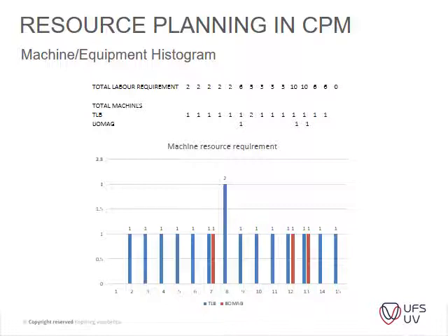On this particular day you need 2 TLBs, and this is what the exercise shows: you don't have 2 TLBs to use, and you don't have money to get a new one, so you have to do a bit of resource leveling, and this is where you cut off your resources.